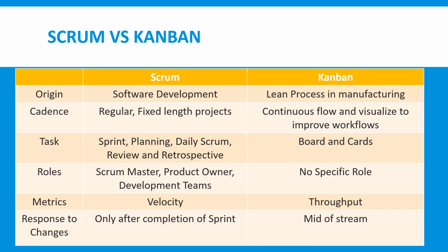There might be 5 or 6 developers in different sprints. So total 90, divided by 3 sprints, means 30 stories. Or if you completed 90 story points, divided by 3 sprints, 30 story points will be your velocity.